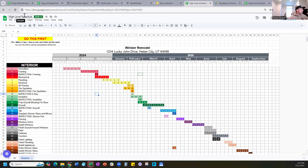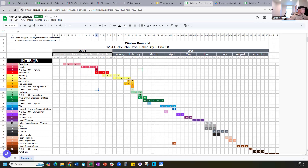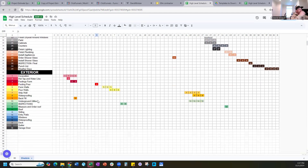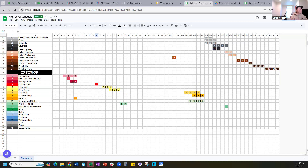I've broken the schedule into two different sections: Section 1 is the interior of the building, Section 2 is the exterior. If you just want one chronological schedule, you can do that. But sometimes we like to track different things happening simultaneously — for example, siding going on outside while simultaneously drywall, tile, hardwood floor, and interior paint are happening inside. So we like to track exterior and interior separately.